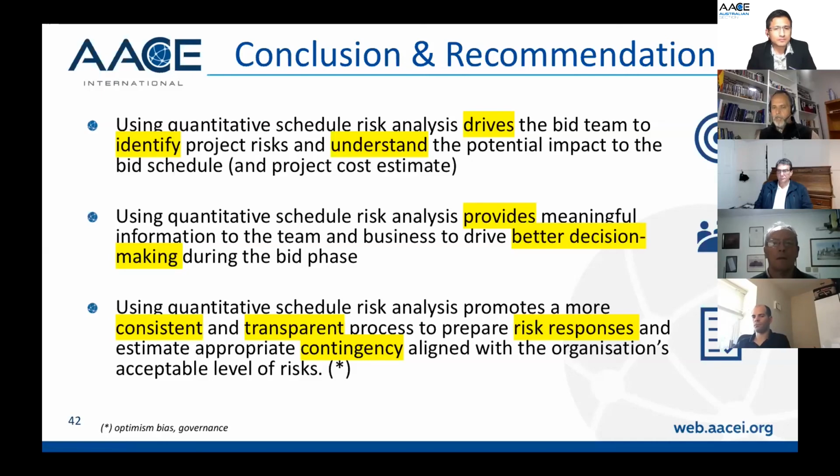But you run the time and cost scenarios together. Why are you doing this? Because you also need to look at, do you prefer to extend the project by 6 weeks? What is impacting your overhead? What is the prolongation cost for your indirects versus spending $2 million to mitigate the risk? So you need to make this kind of decision, Marcus. What is the best for you?